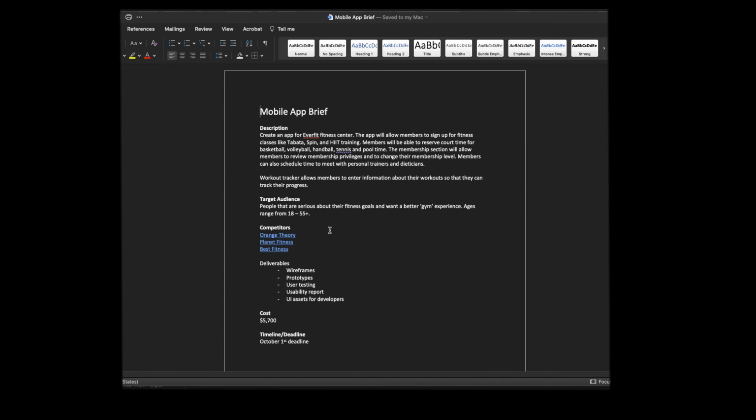In this particular case, depending on all the assets and all the deliverables and everything that's involved, there's a cost here, and that cost could be anything that you determine. You determine this usually from your hourly rate times the number of hours you think is going to go into this. Sometimes you can ask the client for the money ahead of time, like half of it, or maybe a third of it, and then you get paid on the final delivery.